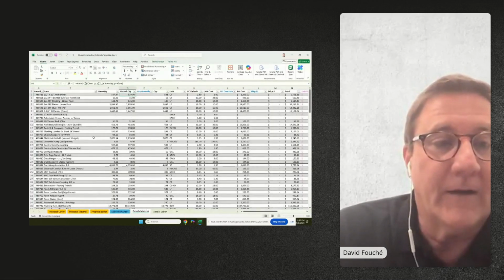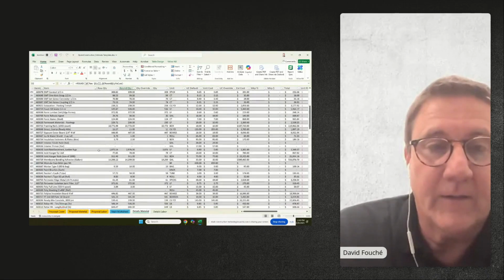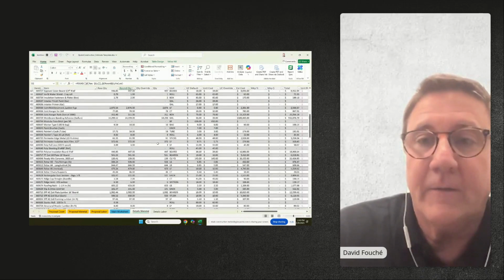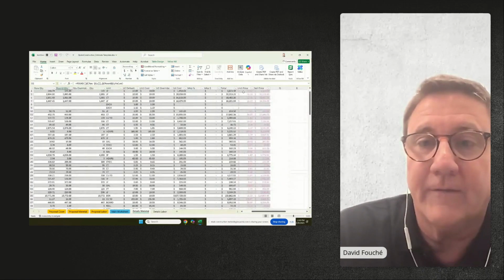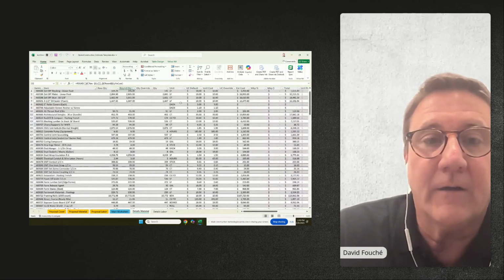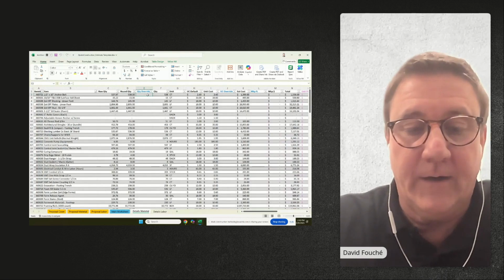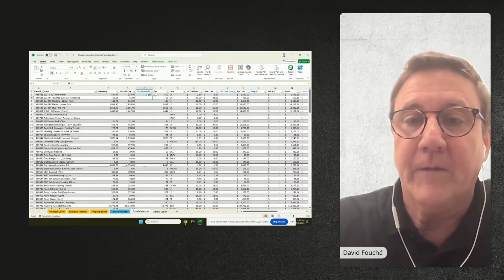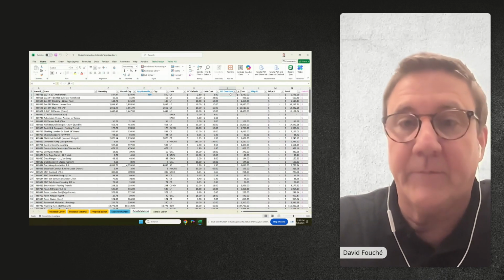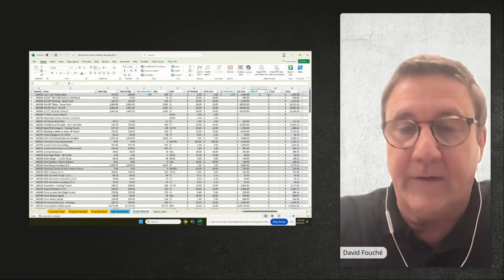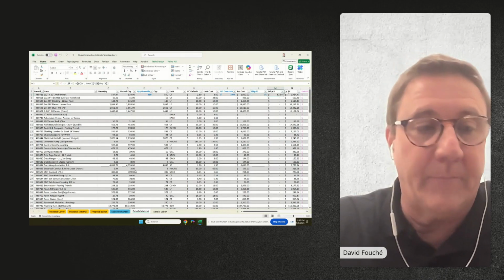So all of my items here are showing up from my material. All my labor items are showing up here. They're in a table that I can control. See, I can set the formatting over here. I can even include new fields if I want. So I've got this quantity override. You know what? I want 550 of those. For my unit costs, we're going to bump that up to $3. For my markup, I'm going to take a 5% markup on that particular line item.